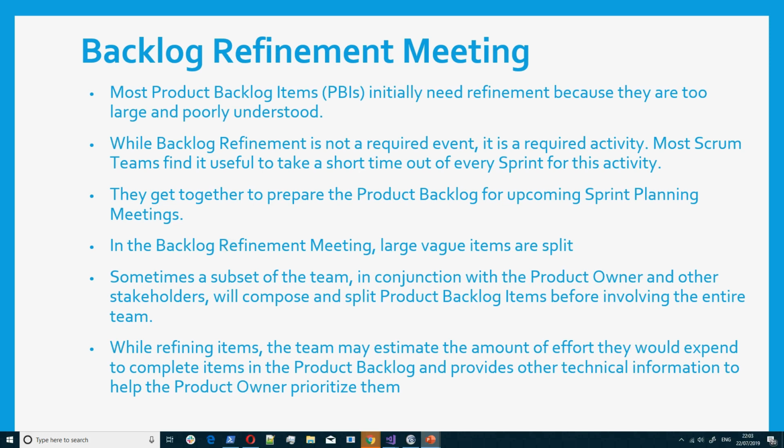So you estimate them in different ways, actually. We'll have a session later on how to estimate. Different people have got different estimation strategies that they use. Some people could use t-shirt sizes. You look at one story, you say this is medium. You look at one story, you say this is large, or extra large, or you could say this is small. So you can use t-shirt sizes.